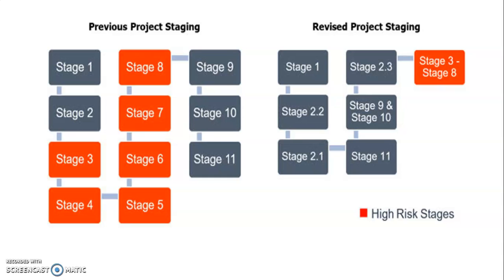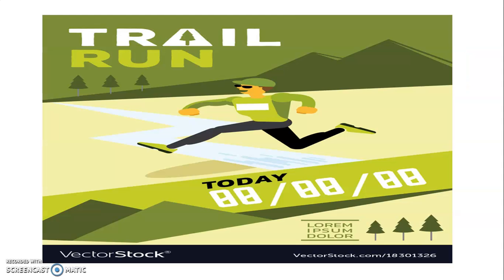The final stage is the trial run. After commissioning of the hospital, some time is taken for functional integration of different units, services, staff, patients and community. Here you need to have the machines tested, the staff recruited, and proper training given to them, and the standard operating procedures made. You have to have the maintenance services put in place, and materials, linen and stationery all procured, and then starts the routine and regular functioning of the hospital.